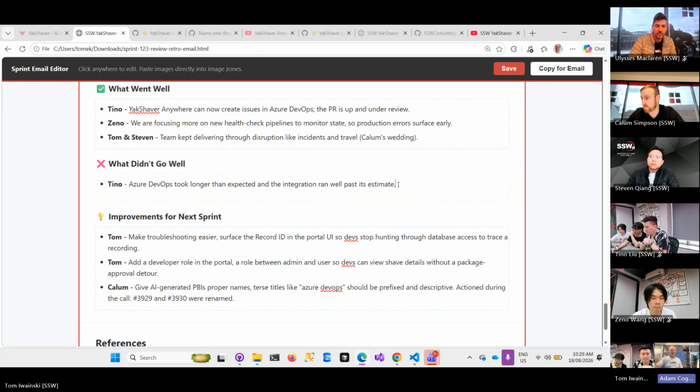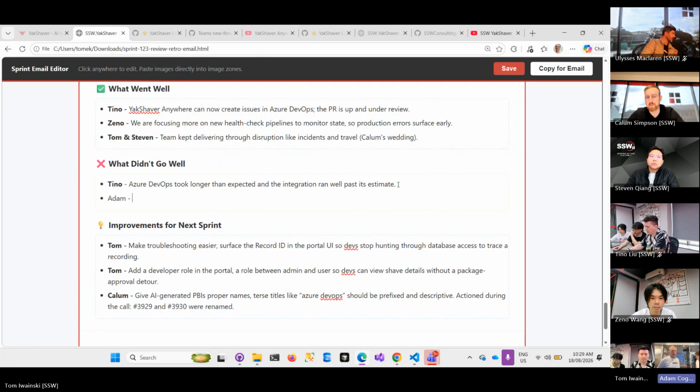So, yeah, terrible timing, but I don't think that you had the situation covered. I don't think you had done your proper preparation. So I don't feel like it should be what went well. I feel like it should be what didn't go well. The team didn't brief the Chinese team to take ownership, and the disruption was headless. We had nobody to run to. And we had to improvise by Rick coming to the rescue or something.